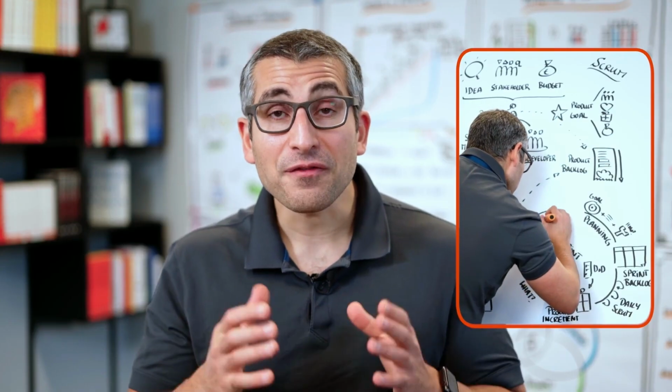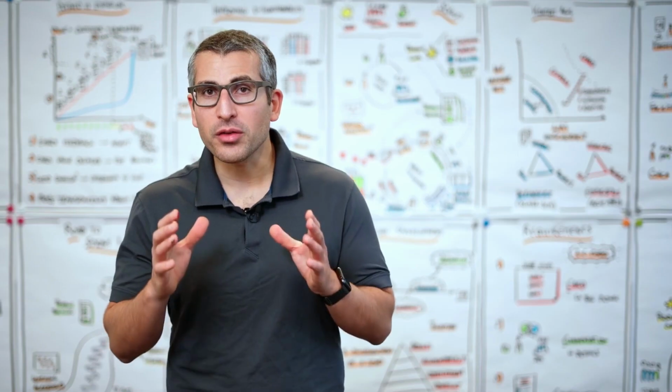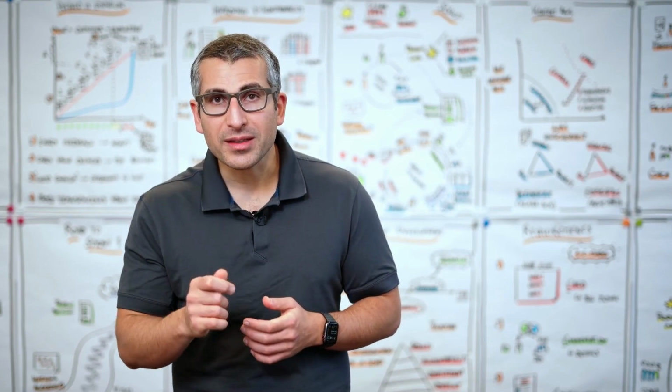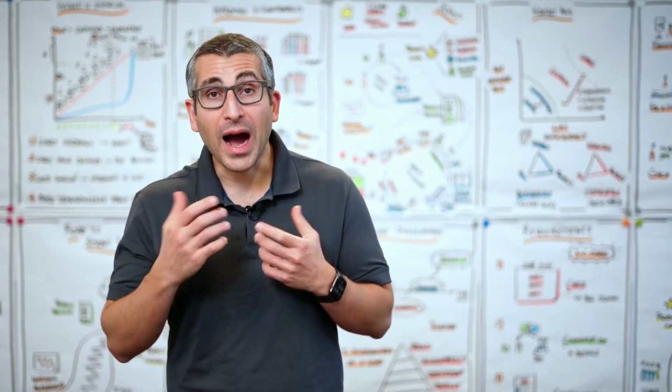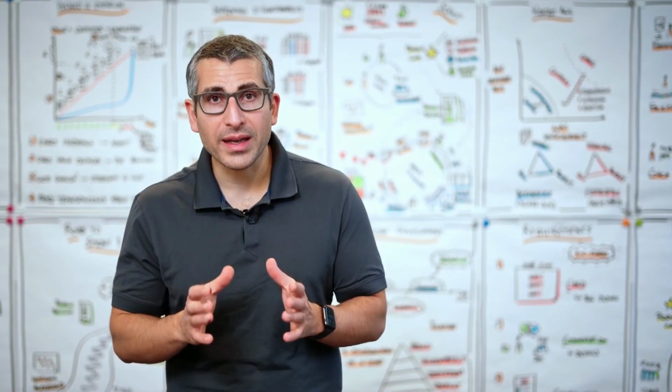The final event, the final meeting during our sprint is the so-called sprint retrospective. Compared to the review, where our focus is completely on what we are going to work on, the retrospective covers how did we work together, how can we improve our collaboration. The Scrum Master facilitates this event very actively, and there are various approaches to do this. One approach that I like a lot is a 5-step approach towards running an effective retrospective. Step number 1, setting the stage, which basically means you make sure that everyone knows what we are going to talk about in the next 45 minutes, 60 minutes.